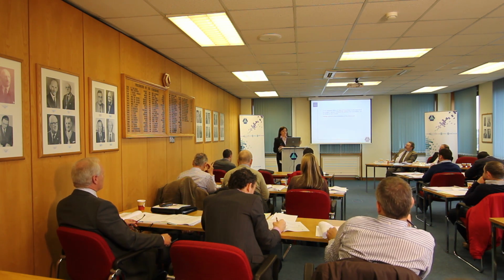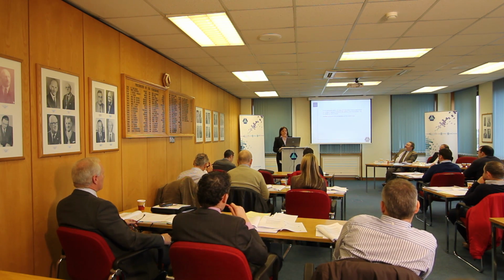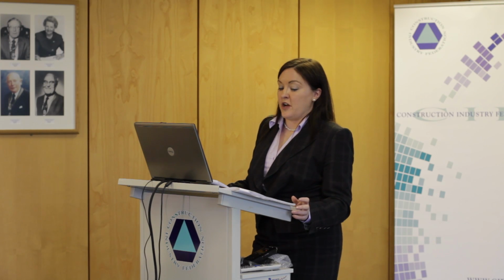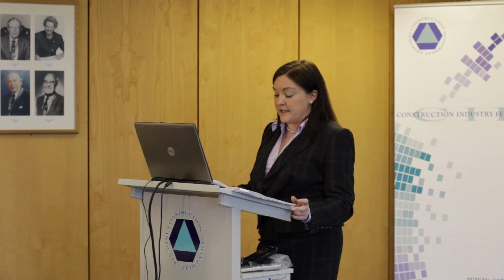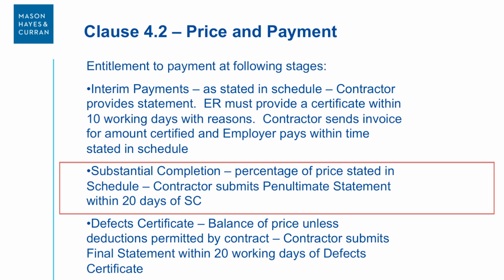Then obviously, if he does agree with your statement and he issues the certificate, you send your invoice and you'll be paid within the time stated in the schedule. It's 15 days under the standard contract, so that tends to be always the period used as well in the schedule for these contracts. Then you're obviously entitled to payment on substantial completion. And you're entitled at that stage to your percentage of the price stated in the schedule, and as was pointed out earlier, it's always 95%.